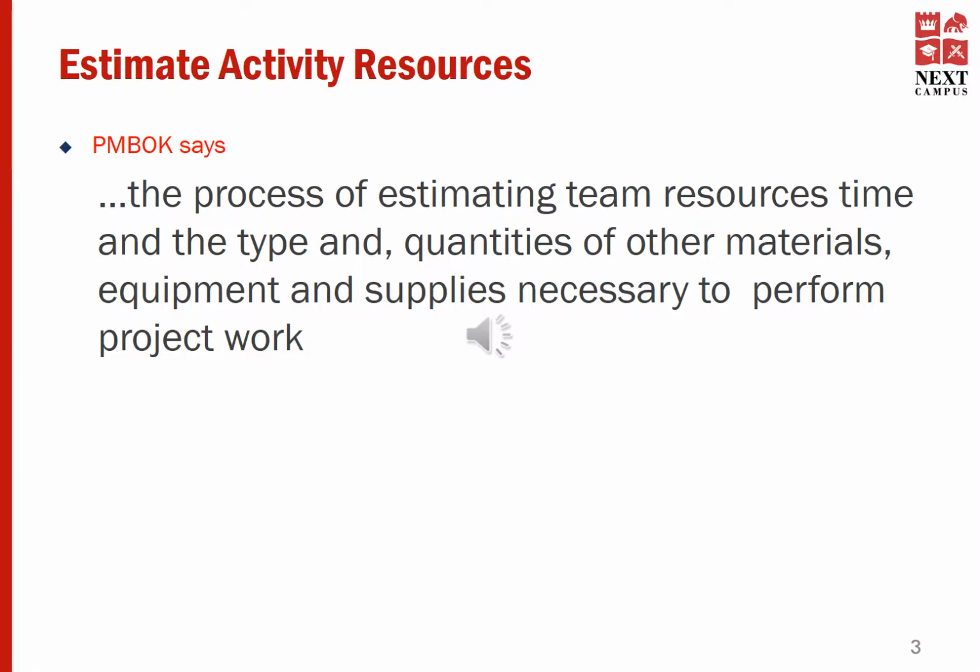If you look at the traditional way of project management and the agile way of project management, how you handle the estimation is totally different. In a traditional environment, what you do is prepare the detailed work breakdown structure and the requirement specification before you estimate the activity resources. So by the time you estimate the activity resources, you have the finalized set of requirements.